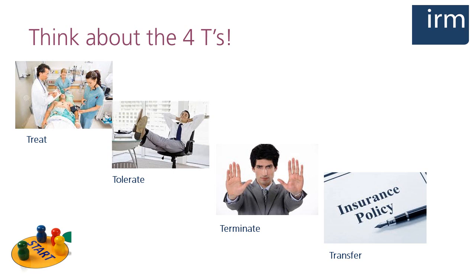This is usually detailed in the venue contract and will remove a great deal of risk from you for the event in a perfectly legitimate manner. Alternatively, you might take every step to protect your employees against back problems incurred as part of their job, but if they're working with people who require lifting, you may well find problems do occur and allegations are made. An insurance contract can help by providing a team of claims professionals who can request and check medical evidence and ultimately, if you have a legal liability, to compensate as the employer.